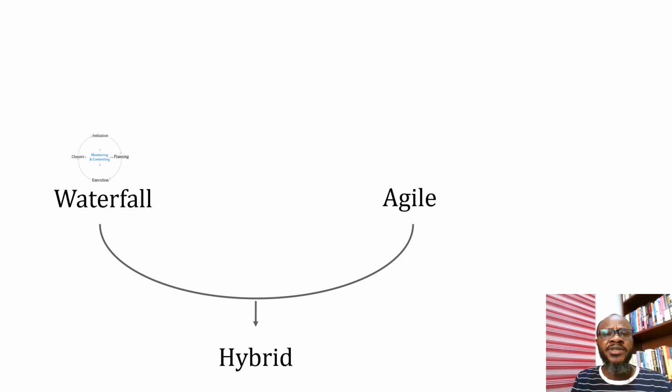Okay, so if the project has been done over and over and over again, usually there is a blueprint, there is a defined process that you can always follow each time you intend to achieve that endeavor. Because of that, we call it the predictive life cycle, because it occurs in a predictive environment. The things that are done in that environment have been done over and over and over again. So we know our way around things. That is when you use the waterfall model.